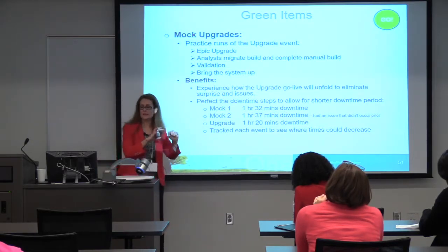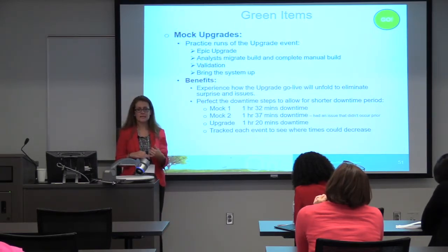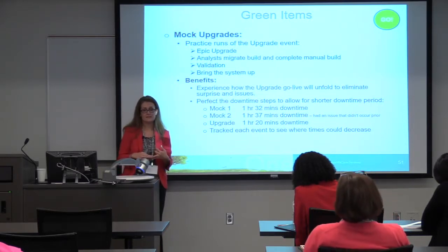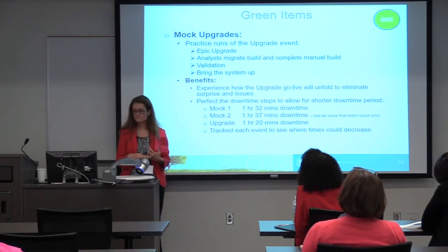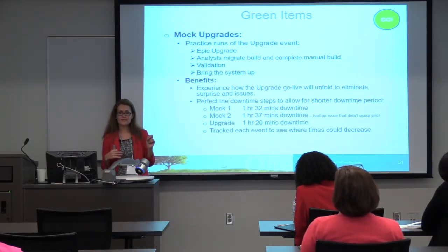EPIC did their upgrade piece. Once the system was released, the analysts went in and completed their build. They validated that all of their build was correct and the system was still behaving like they want it to. And then we brought the system back up. We did this 2 times. We had a third planned just in case we needed it.